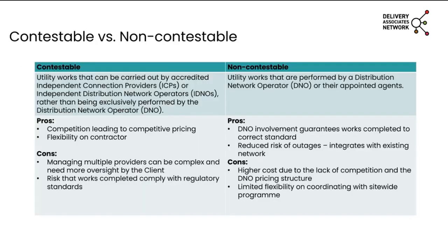Now, once a utility company has completed a design, they'll normally dictate whether their designs are categorised as contestable or non-contestable, and it's critical to understand the distinction between the both for effective project planning and execution. Now, for contestable works, these are tasks to be carried out by third-party contractors, and can be appointed by the client or the contractor directly.